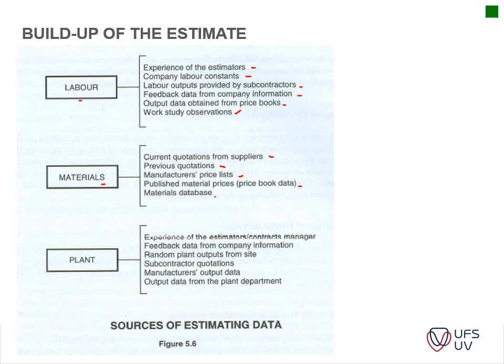And then you start building up a material database. That's very handy whenever you do tenders, because it makes the estimation process quicker whenever you have a nice database set up. Then you look at your plant. The experience of the estimator is very important with your plant because it's all about operation time and cost whenever you are calculating your plant.